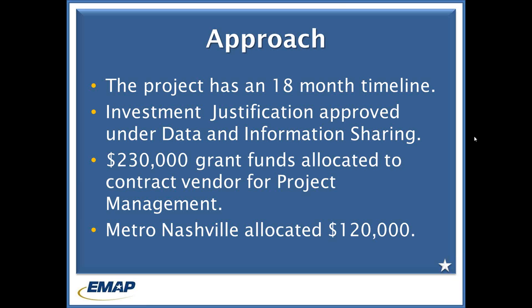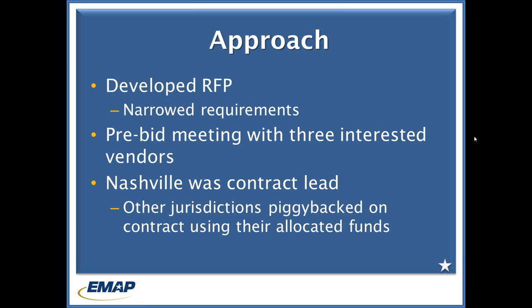and the next slide is a duplicate, so Christy, you can skip to the next one on approach, where we developed the RFP, and that's a request for proposal through our purchasing department. We had very narrow requirements. We had a lot of deliverables, a lot of tight timelines and schedules for the potential awarded bidder to meet. There were required numbers of meetings on a weekly and monthly basis during that whole project timeline, as well as status reports.